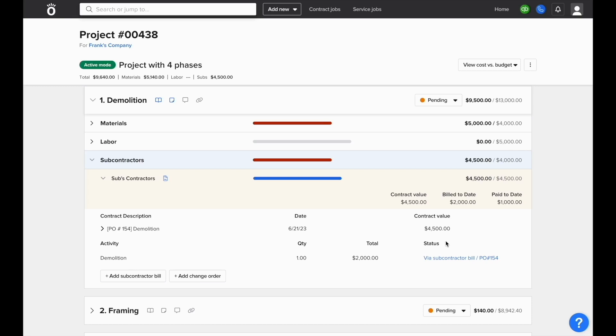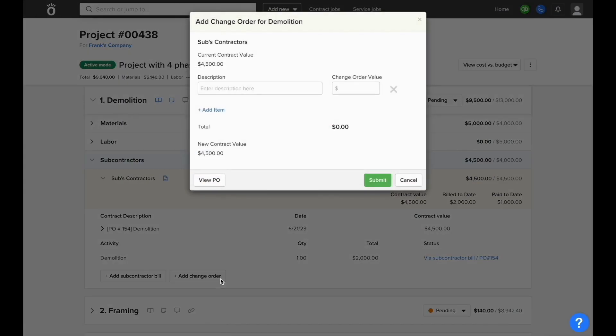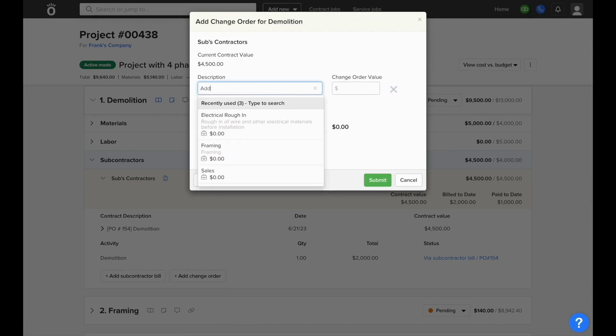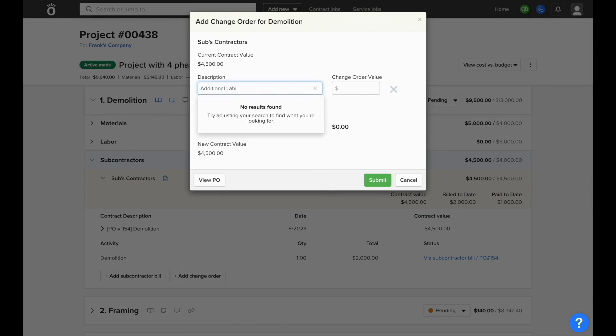From here, we also have the ability to add change orders that are relevant to this subcontractors contract. When you click add change order in the bottom left corner next to add subcontractor bill, you'll be prompted to enter in a description of the change. It can be connected to your catalog of products and services if needed, but it's not mandatory.